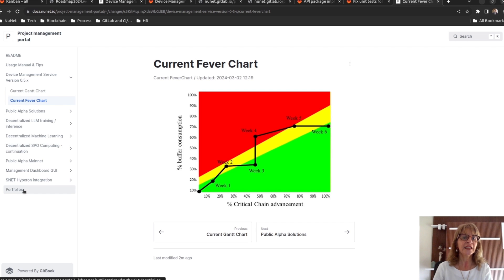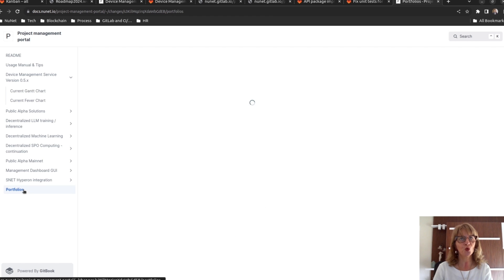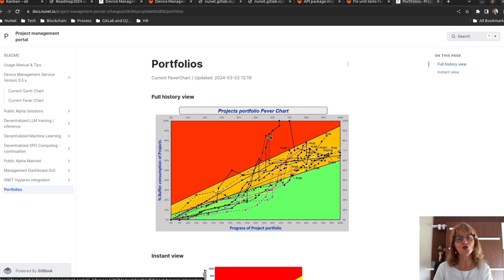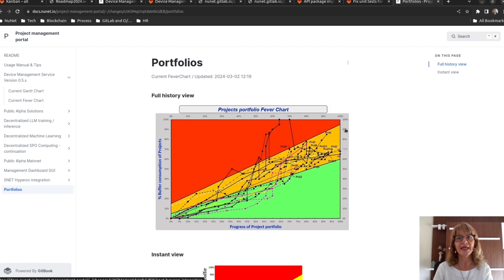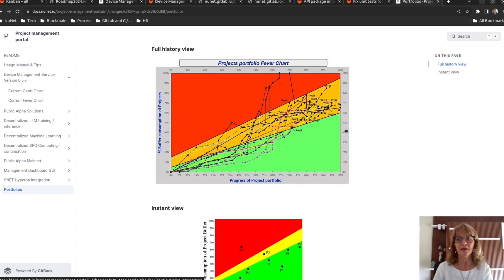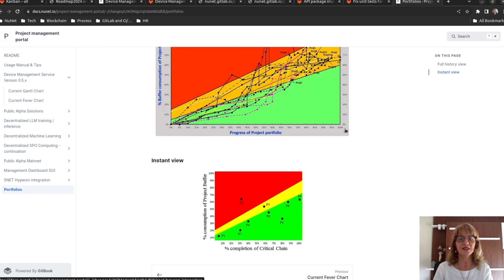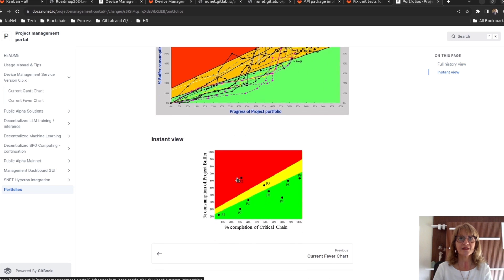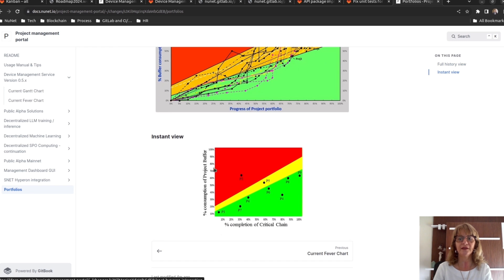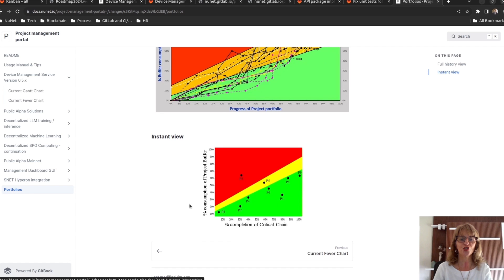The critical chain approach is also used to manage project portfolios. We can create a fever chart containing all the projects because the two axes are calculated in percentages. So we can have projects with different scales altogether.